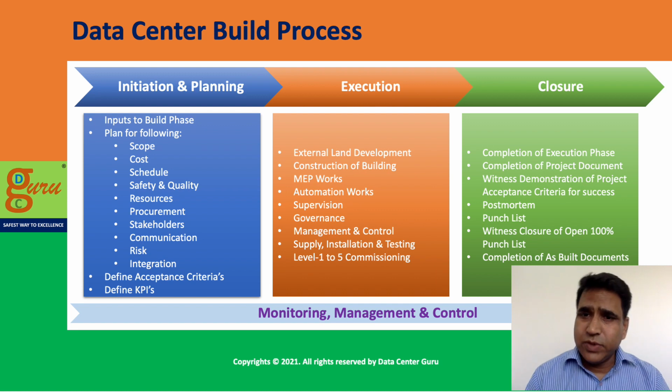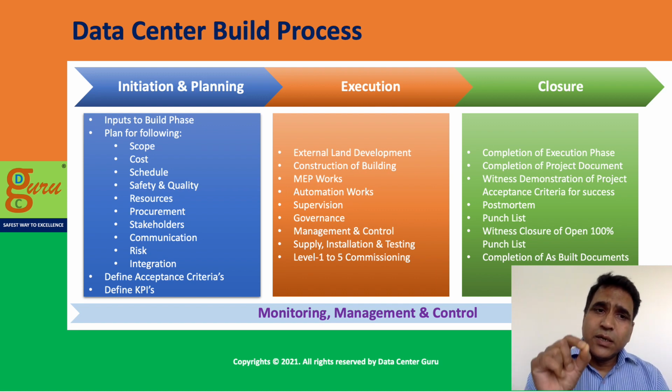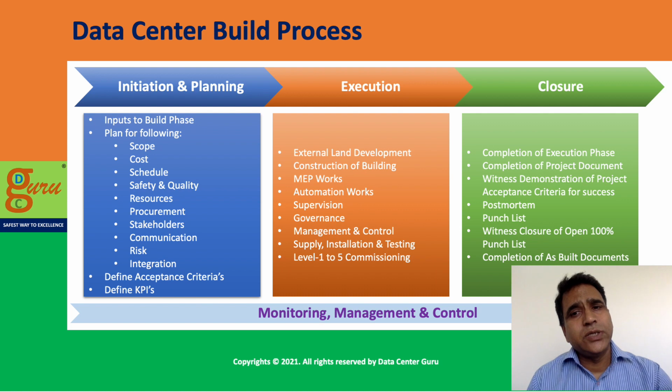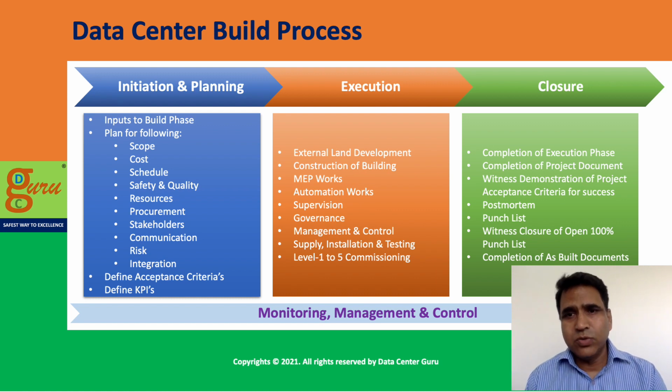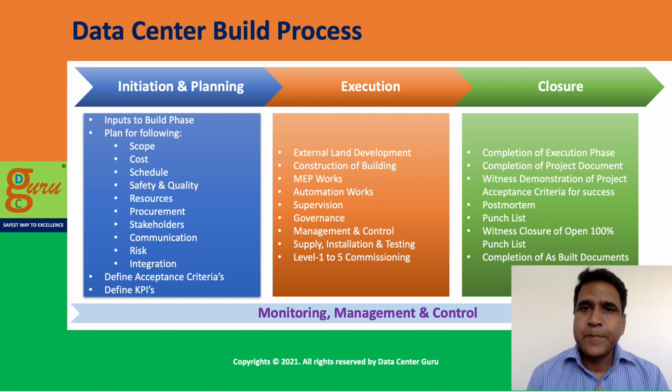In the beginning you defined acceptance criteria for each and every system and subsystem, and also the final project acceptance. Each system and subsystem you do during the execution phase at different stages, and the final project acceptance you do in the closure phase, and you also need to witness the successful demonstration of the project acceptance criteria.